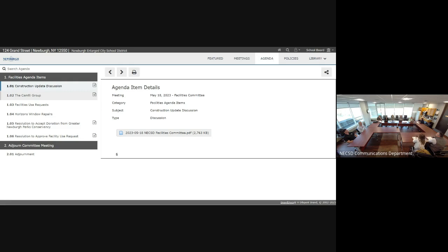So are things better now in going out for bid compared to maybe a year or two ago when labor was tight and items were in short supply? Do you anticipate that being a little better at this point? If you're referring to dollar-wise, some things have come down, some things have increased. I would say it's an even balance. We're gonna see the same that we have in the last couple of years, I believe. We haven't seen much drop dramatically. Mechanical was always one of the toughest items to grasp because it just kept increasing in cost. And we're seeing it stabilize, but we're not seeing it drop.